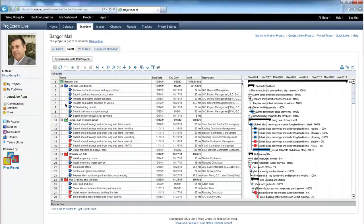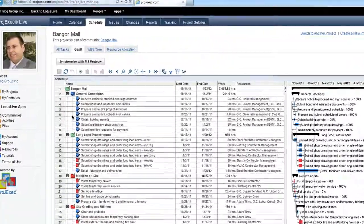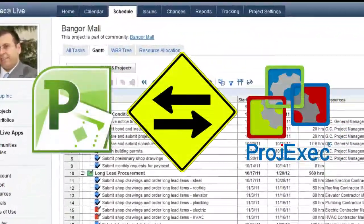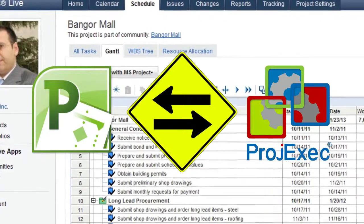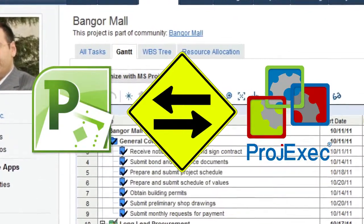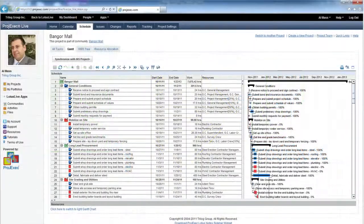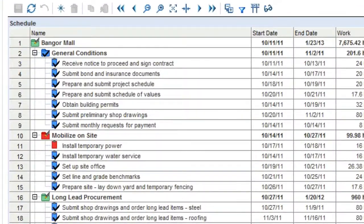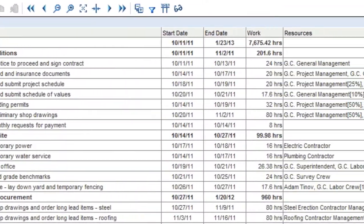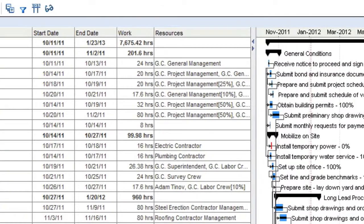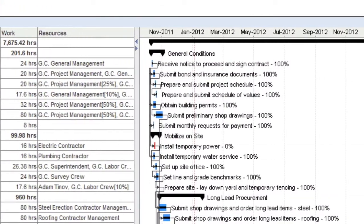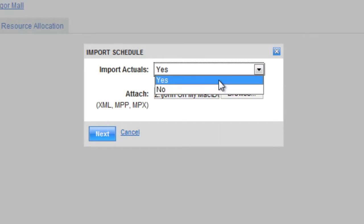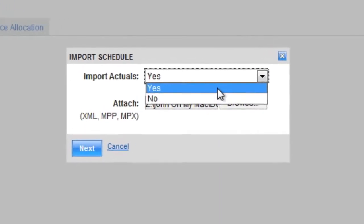Once you have a project plan in Project Exec, whether or not you started with an MS Project Plan, you can export and import your projects between Project Exec Live and Microsoft Project as much as necessary. When you import into Project Exec Live, the entire project plan — including all tasks, all resources, and all calendars — are imported. You also have the option to import task progress and actual completion dates.